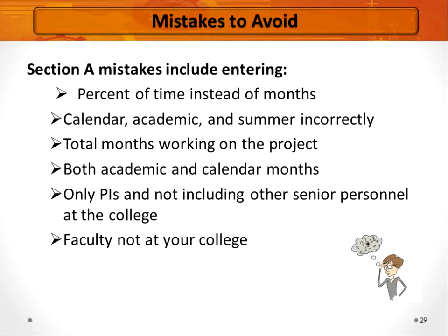Okay, I see one in the chat room, which is: we have 10 months in our academic year. How is that calculated? I actually had the same thing. If you look at the total number of days that you're supported, at least at my old home institution, I was actually supported for 9 months, but they had the pay arranged so that I was paid for 10 months. So what you have to do is just back that out and figure out what it is per the actual number of days you're being paid.